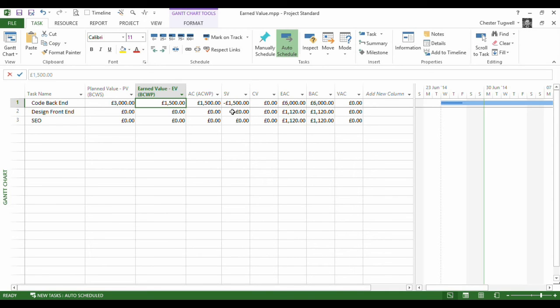Our schedule variance shows a minus figure - SV, schedule variance - and that basically tells us that we're behind schedule because we've only spent half the amount of the work we should have done.